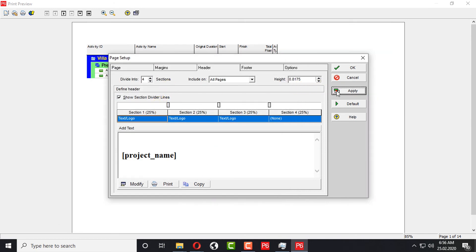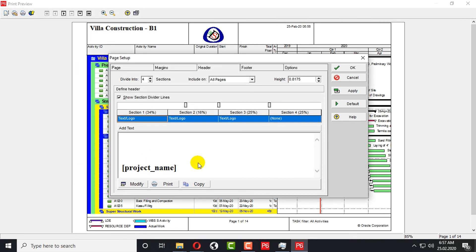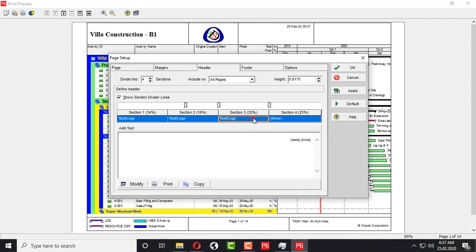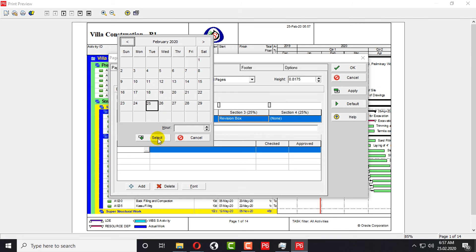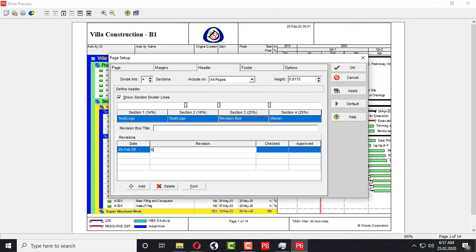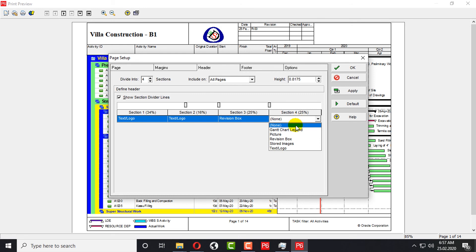The project name will appear. You can also change the size of the text, and by pressing Enter you can move it to center. You can see it is adjusted to center. Here I will add a revision box. In the revision box you can add the date of your revision — for example 25th February — the revision number, and checked and approved name. You can add whatever you like.